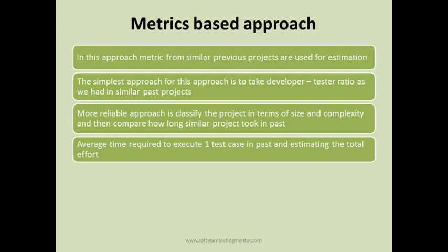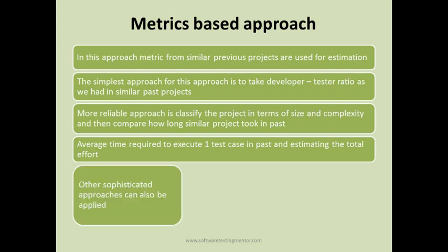For example, the average time to execute one test case in the previous test cycle was 1 hour. Then you use that estimate for one test case, and you can estimate the total effort in this phase as well. So that's another metrics-based approach. Other sophisticated approaches can also be applied in the metrics-based approach.